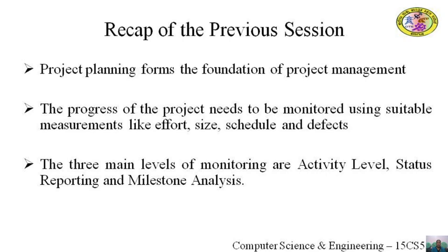Status reports are often prepared on a weekly basis to check what has happened and what needs to be done. Status reports typically contain a summary of the activities successfully completed since the last status report, any activities that have been delayed, any issues in the project that need attention, and whether everything is in place for the next week.